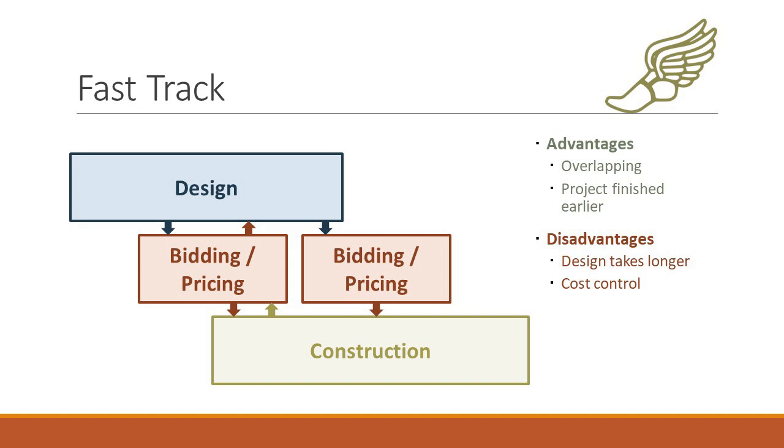What you try to do, and that's another contract I'm working on right now, is build into the contract a method where it says, I'm going to give you my first control estimate, and based on that price and everybody else giving their first estimate price, I win the award, and then as the designs go further on and complete, I will give you an updated price.